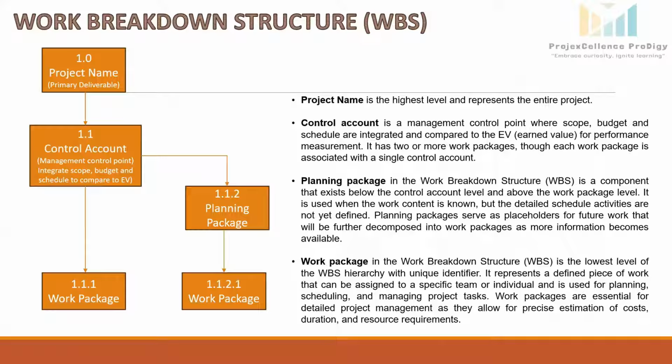Even though there may be multiple work packages, each work package is only associated with one control account. It's very important to understand here. Each work package is only associated with one control account. This means that a work package can only be measured and managed under a single control account for clarity and proper organization.